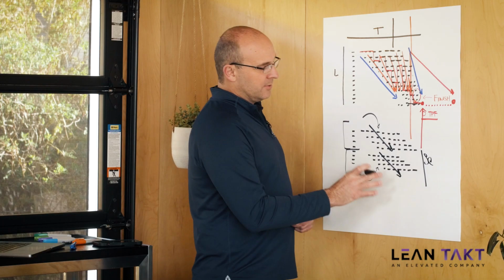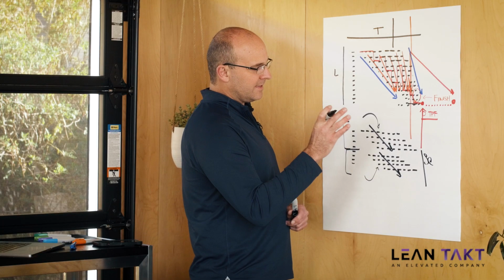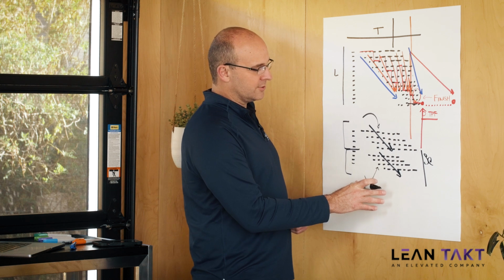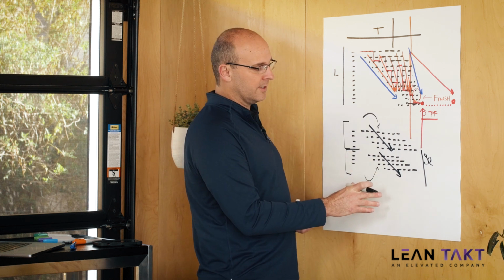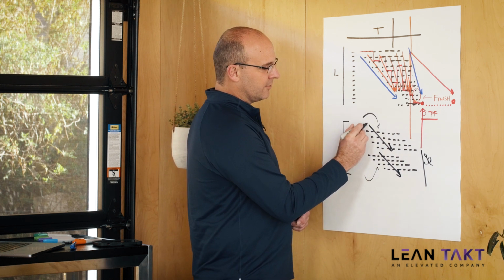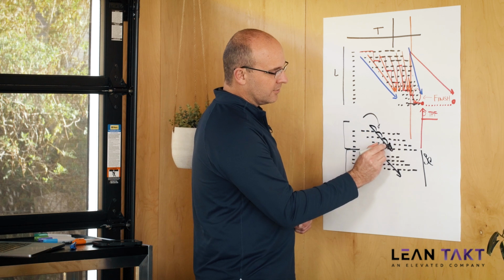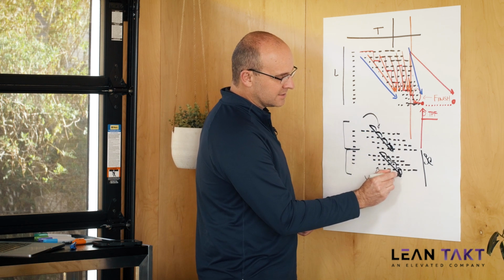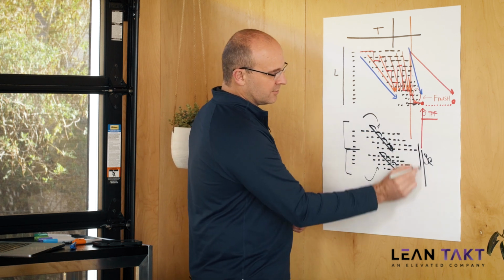What we did is we put this into a takt plan and issued a $0 change order to all the trade partners, aligned procurement, and got owner buy-in, and everybody started to follow the rhythm on a flow consistently throughout. And they finished a week early.